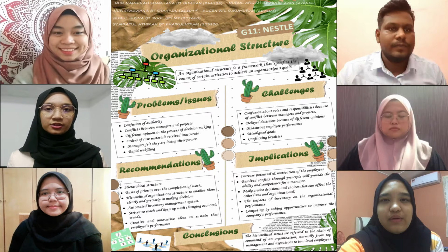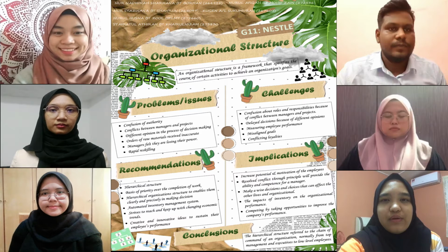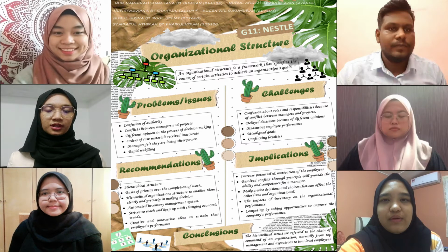Besides, the matrix structure breaks the concept of unity of command, and without it, the uncertainty of who reports to whom is likely to increase, and it shows poor communication between the departments. The second problem that arises is conflicts between managers and projects. As employees need to respond to more than one manager, and at the same time they might be working on multiple projects, it leads to employees becoming conflicted between managers and projects.